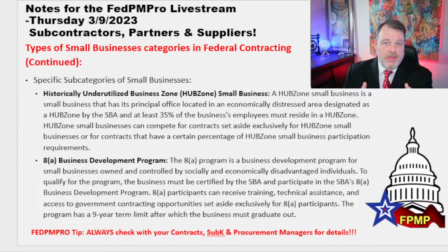And so the advantage of something like this is that when they specify HUBZone, a lot of times those HUBZones might be close to the service delivery location. So take advantage of those kinds of things, because there's a lot of geographic knowledge and understanding when they are delivered with a principal office in that place and 35% of the staff are in the area. That can be hugely advantageous when you're delivering, let's say, to a customer location that's right there in the same area. These would have designations on a contract that say we need X% of HUBZone small business participation. You'll see these kinds of situations, and they'll be certified. So you won't see a situation where somebody approaches you as a HUBZone and you're not sure. It'll be something that is definitely out there and known. So HUBZone is unique because it's kind of geographic.